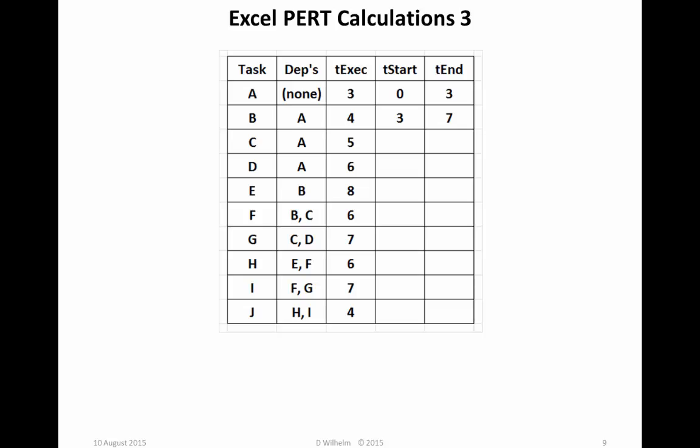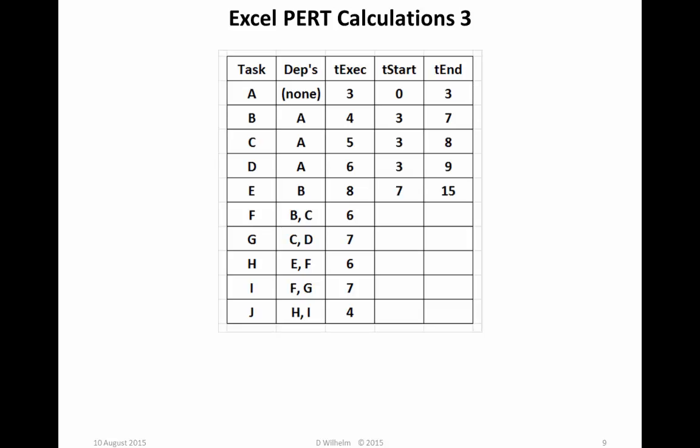The next three tasks, tasks C, D, and E, are similarly determined. Each task has a single dependency. So Time Start C equals Time End A, Time Start D equals Time End A, and Time Start E equals Time End B. The values for C are start at 3, end at 8. For task D, start at 3, end at 9. For task E, start at time 7, and end at time 15.